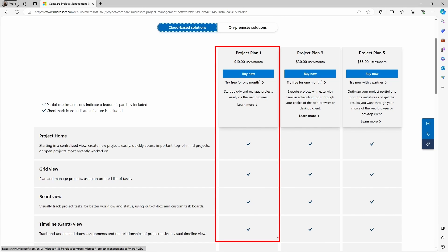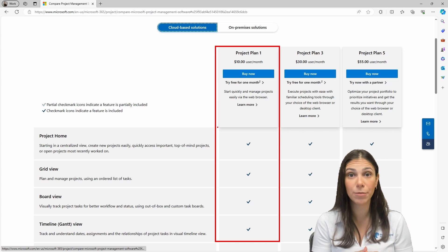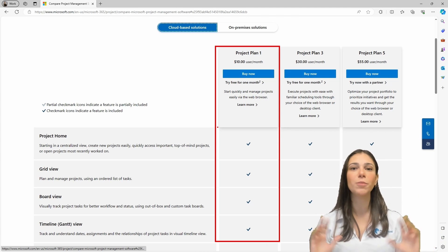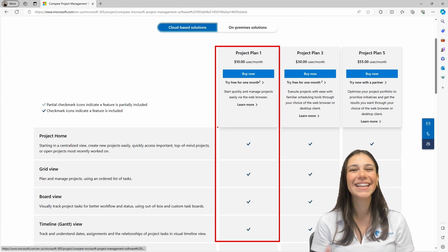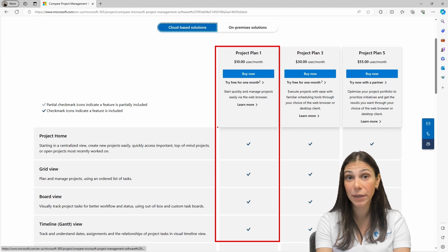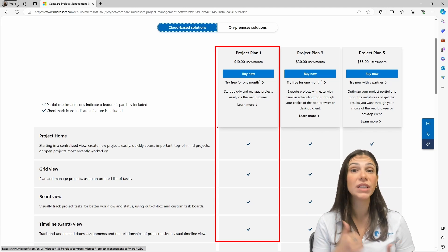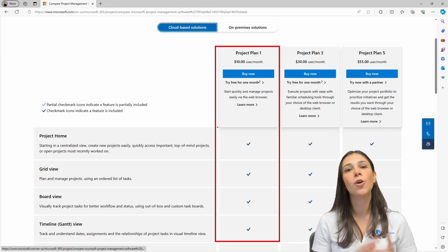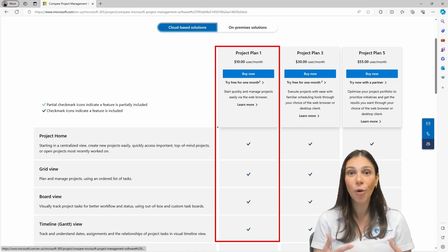Project for the Web is not the same as Project Online. It will allow you to create projects with your organization in a way that everybody can contribute. Everyone will be able to edit tasks and mark their tasks as complete, so you're basically working with a team. However, Project for the Web will not allow you to track costs. Also, Plan 1 will not give you access to the critical path. For the critical path, you need either Plan 3 or Plan 5.